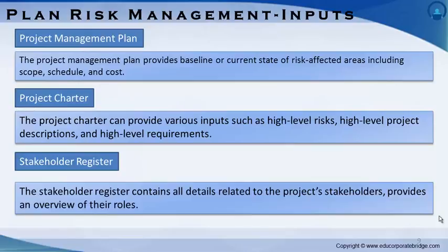The schedule management plan defines how schedule contingencies will be reported and assessed, and the communications management plan defines the interactions that will occur on the project and determines who will be available to share information on various risks and responses at different times and locations. Once it is prepared, the risk management plan also becomes a component of the project management plan.